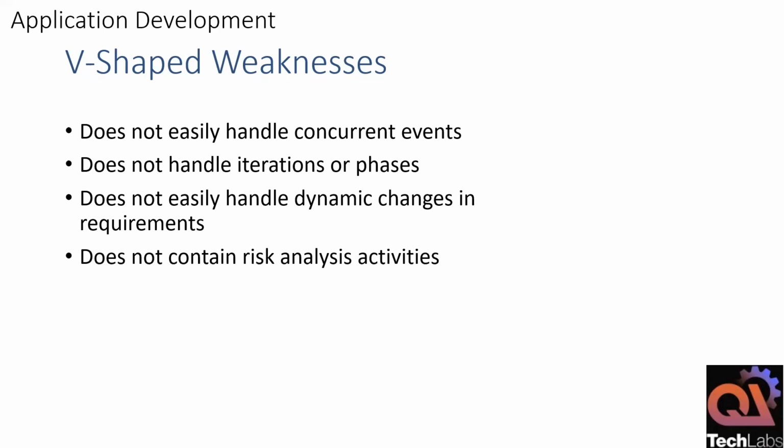So what are we discussing here? We are discussing application development. How can a software application, how can a web application be developed? One is define all requirements, then design, then implement, then test it. Another way is define requirements, and parallelly run, do some of the activities. When you are doing solutioning, do some of the other activities. Right? When you're putting the foundation, you can also plan to order bricks. You can also plan to bring in cement to the location.